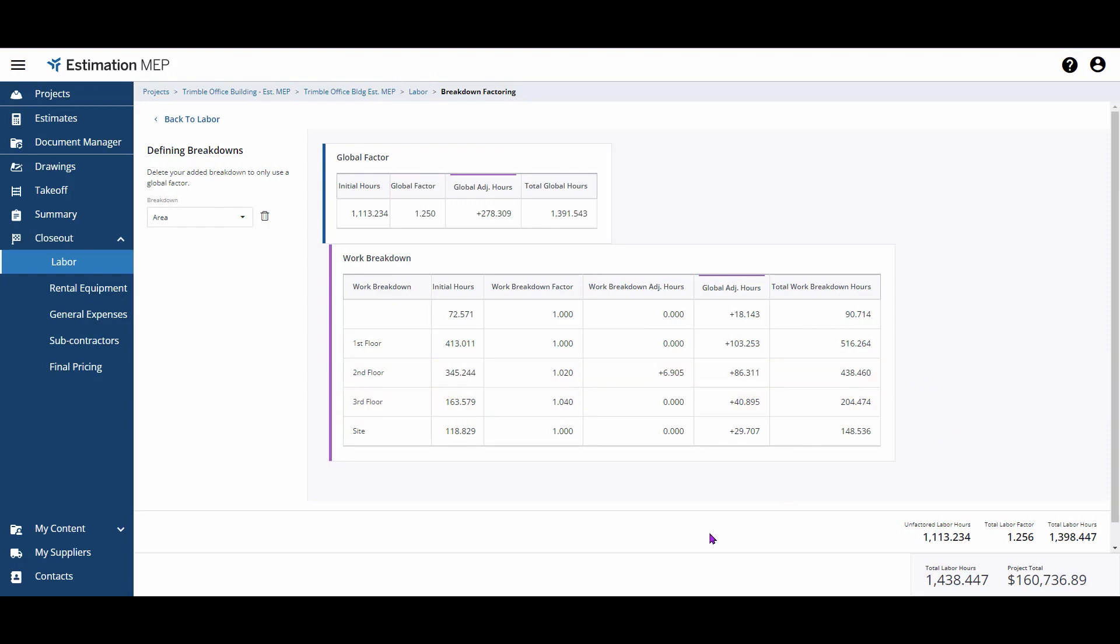Here, I've applied 2% direct labor additional on these work breakdown sections. You could also repurpose one of the work breakdown structures to apply factors for things like underground or working at a height.